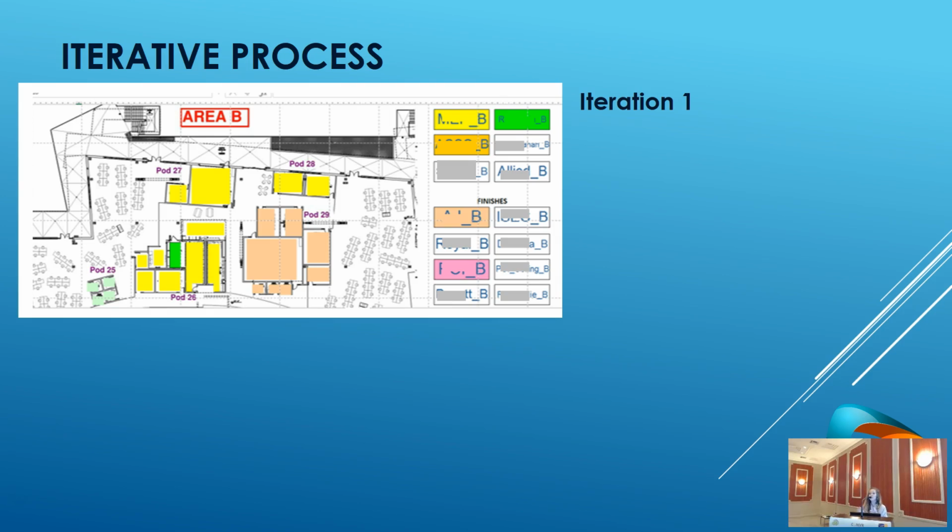So basically what the program was doing, you just had to export the schedule from Primavera, and for those who are using Primavera, you can just export it in an Excel spreadsheet. You copy-paste it in an Excel workbook, and then you enter a date, you push a button on the Excel spreadsheet, and it populates all your 2D floor plans, and it colors up all the space used for each subcontractor. So it didn't look good in the first iteration.